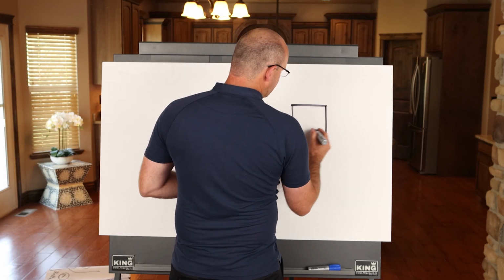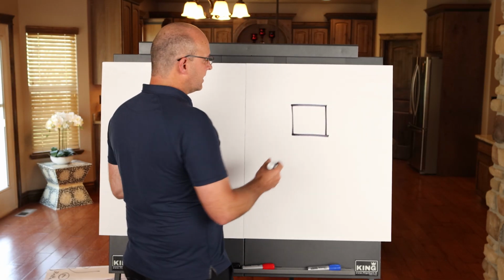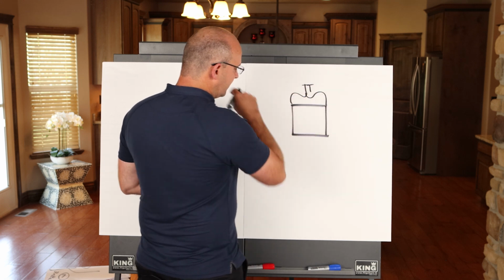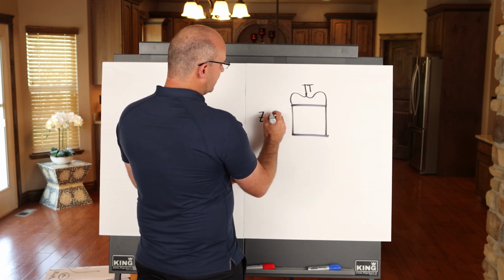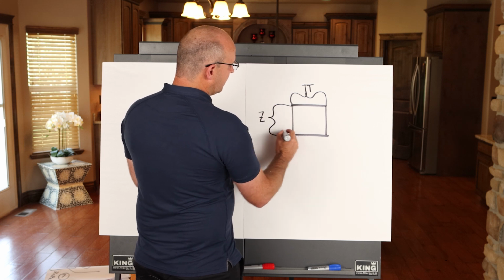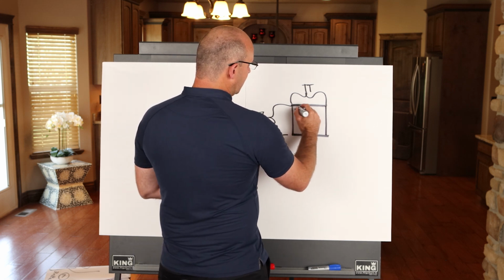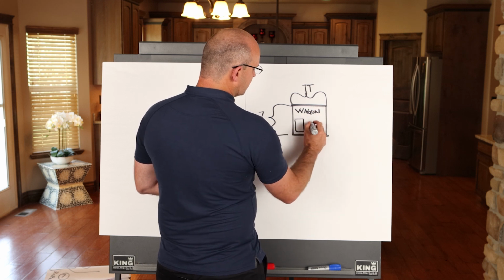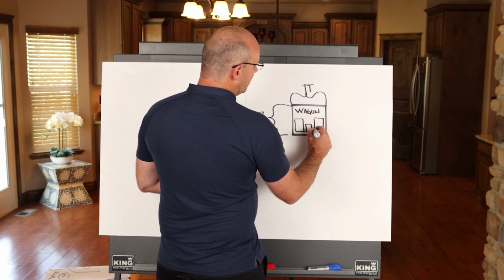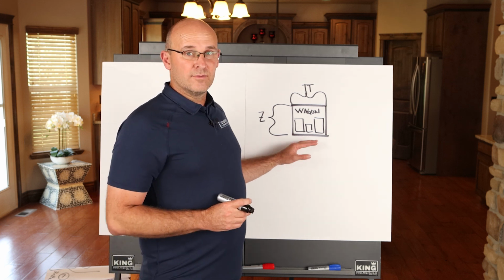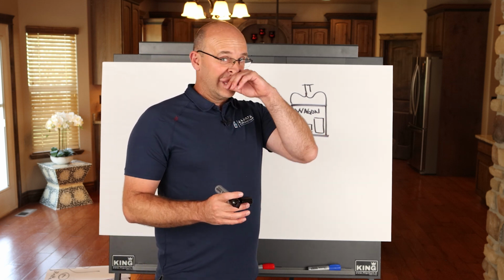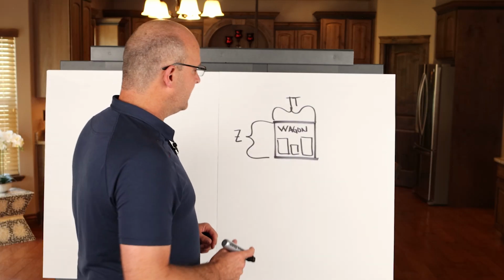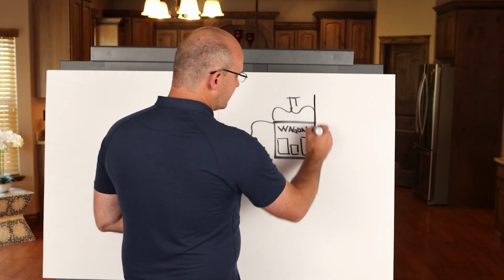What work packages fit inside a takt wagon? So a takt wagon has your takt time, which is basically the time that you have, and it has your zone size, which is how much work that you need to accomplish. This is called a wagon. And inside, you'll have different work packages. That means portions of work done by trade partners that can work together or by themselves, however you package it, but within that takt time in that zone. And the reason that that's important is because it gives a target.